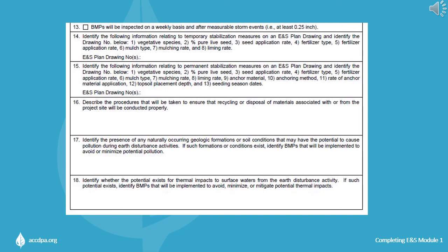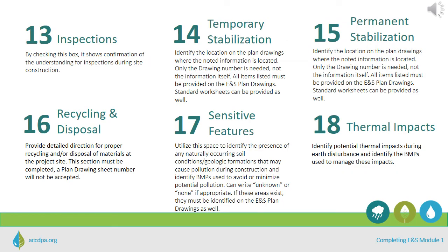Item 16 is to be completed with detailed direction on proper recycling or disposal of materials at the project site. A plan drawing sheet number will not be accepted here, as the NOI instructions explicitly state that a description is required on the module. Item 17 should be used to identify the presence of any naturally occurring soil conditions or geologic formations that may cause pollution during construction, and identify BMPs used to avoid or minimize potential pollution. The words 'unknown' or 'none' can be written if appropriate; however, it is suggested that a plan of action be provided if unexpected conditions are encountered. If these areas are known to be within the site boundary, they must be identified on the ENS plan drawings.